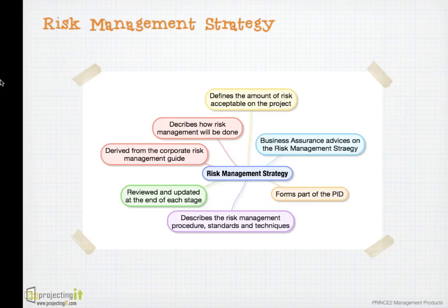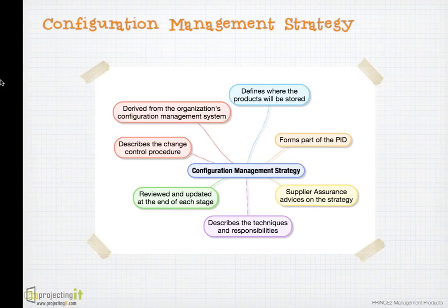It becomes part of the project initiation document. It's a baseline document reviewed and updated at the end of each stage. The configuration management strategy is also prepared during initiating a project. The configuration management strategy also is a baseline document that becomes part of the PID.